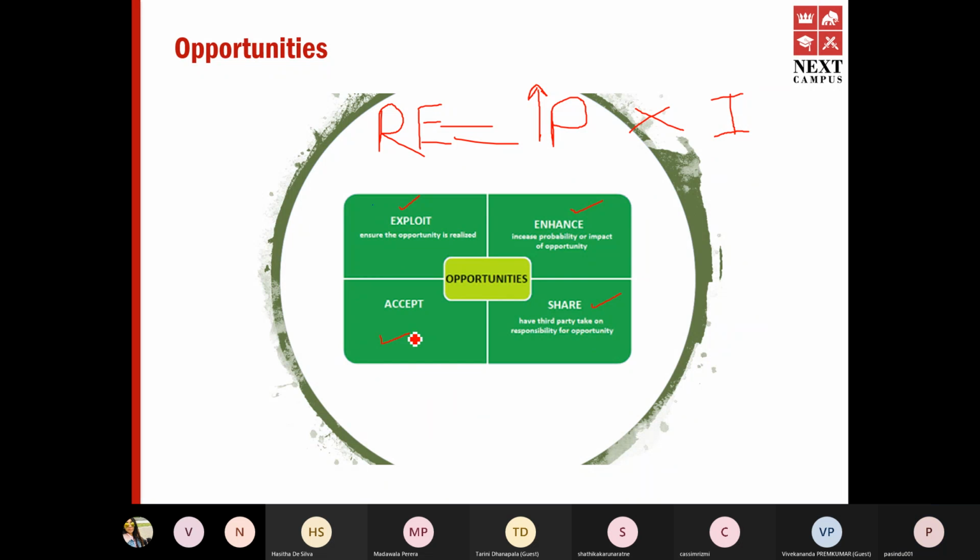Like I said, if you hear upfront that there is a possibility of a tax increase on imported vehicles, probably what you would do is bring down vehicles before this rule is implemented, so that when the rule is implemented, you have a lot of vehicles which you brought in with lesser tax, so that you can sell them at a higher price. You increase the impact of that risk. Does that make sense, Shatika? Yes, Pasilu. Understood. Okay.